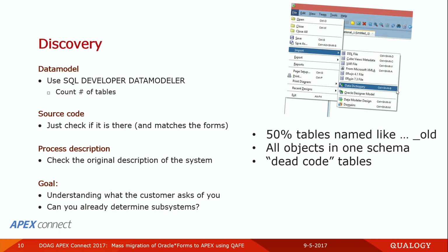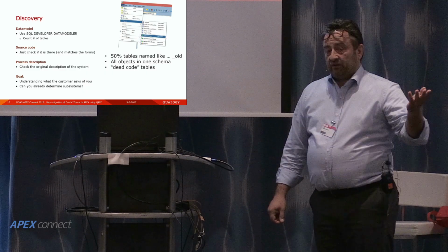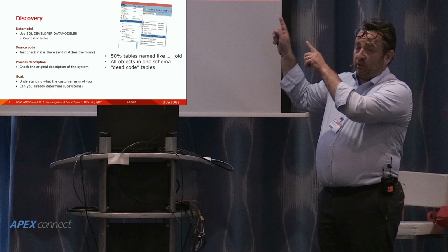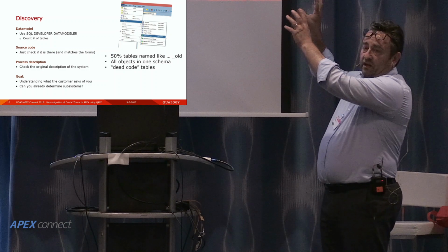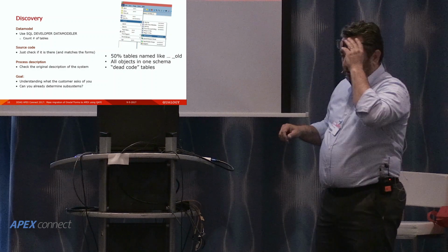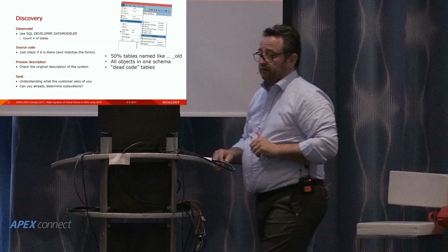You will have considerably more effort needed to clean that up than in the environment where it is nice, where you see every system in its own schema or several schemas with a nice naming standard with all stuff in place. At this point, this is enough for me. I can get my first taste of the data model. I only have 4 hours, bear in mind.